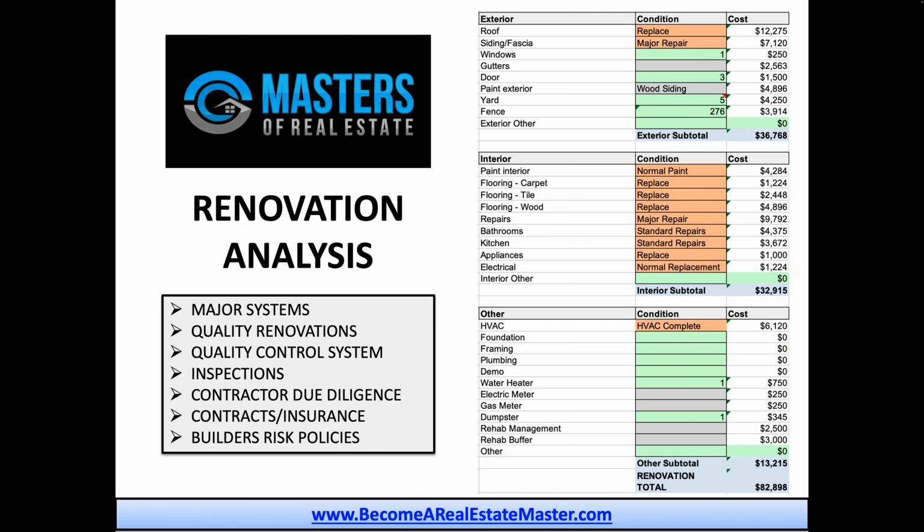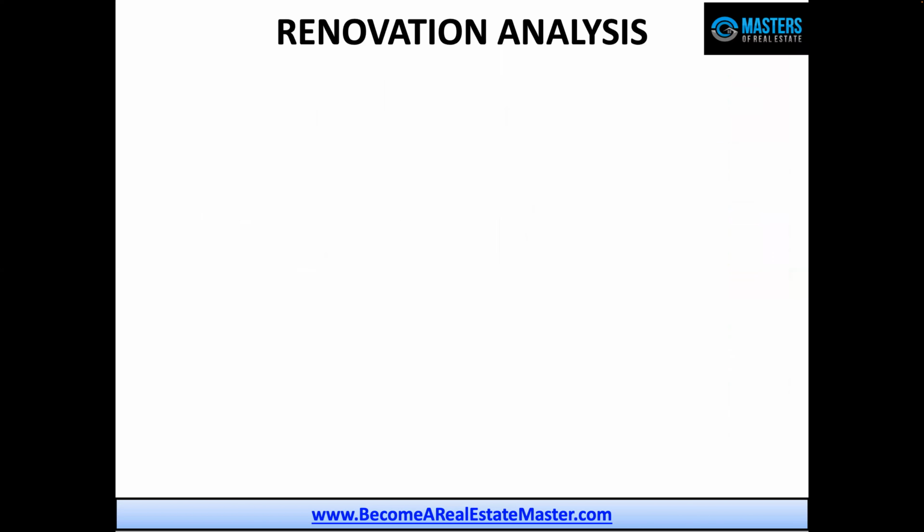So getting those builder's risk policies in place also. As far as your policy, if you go get a policy that is meant for a renter and you have a claim, the insurance company is not going to pay you. So you need to get a builder's risk policy because it's under construction and probably going to be vacant for over a month. Once it's vacant for over a month, then you need to have that construction policy in place instead of the renter's policy.